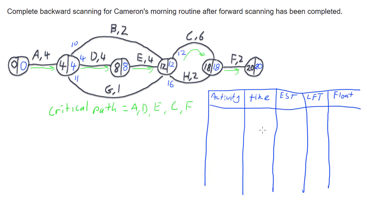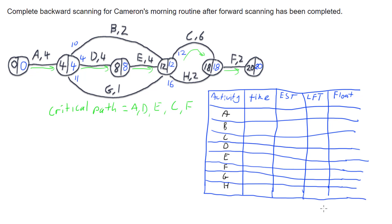Each row in the table represents an activity in the network. So I have activities A, B, C, D, E, F, G, and H. Putting in the activity times: A took 4 minutes, B took 2, C took 6, D took 4, E takes 4, F takes 2, G takes 1, and H takes 2. Now I can go through and put in the earliest start times — the values that already came from forward scanning.